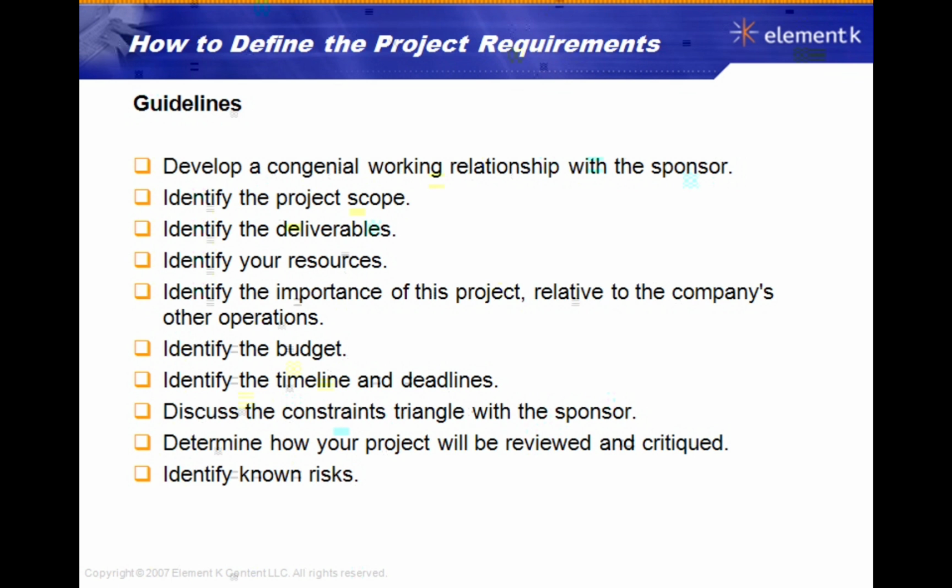It's important to understand this because if the sponsor says to you, my most important thing here is just getting the project done on time. Yes, we have a budget. Yes, we have a scope. But we've got to get this project done on time. So if you need more money and it's going to help you get the project done on time, then I'm going to support you on that. So it's good to have that information up front.